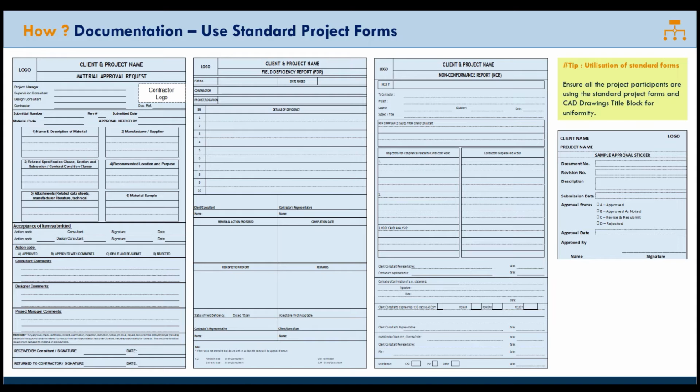All right, so these forms are very critical on such a project. Based on these forms only, the information is captured: when it came, when it is reviewed, when it is approved, or when it is rejected. After the review and approval cycle, the forms with the signature are scanned and uploaded back into the document management system, and sent back to the contractor.